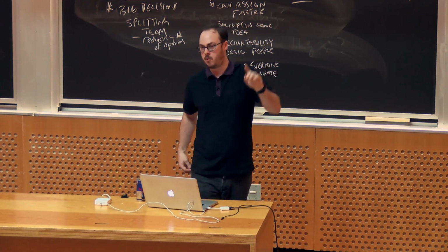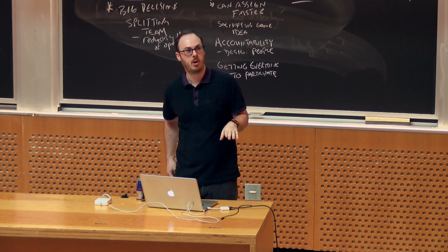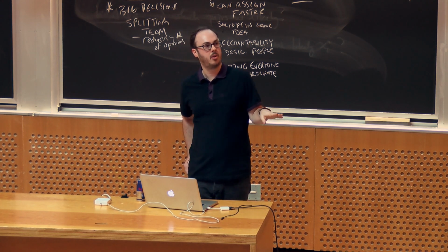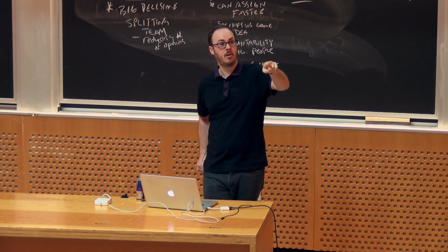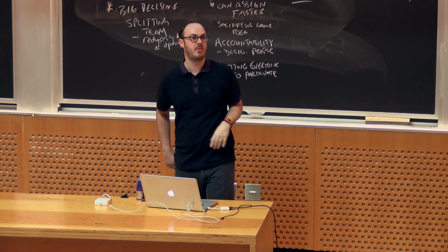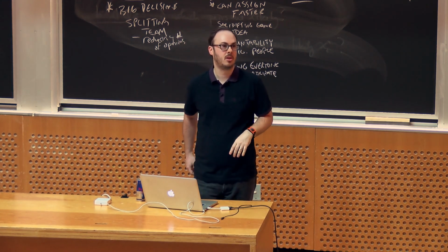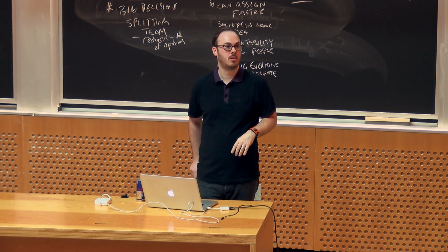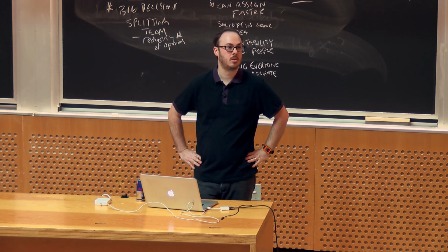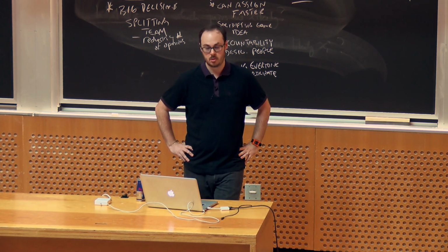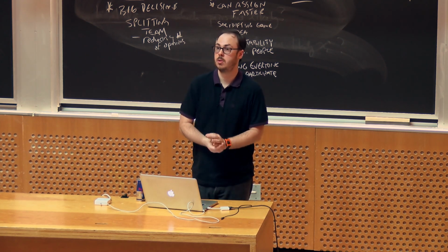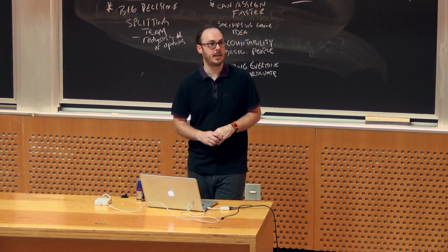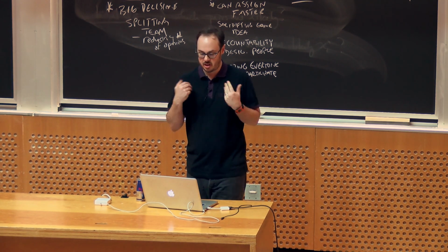So who has a formal sprint process where you plan your sprint before you start? So you create a task. You create your sprint task list at a meeting. Is everyone there, or that's when you're saying not everyone's there? We have the tasks, and we hope to complete them by the end of this week. Okay. So we do have a formal, week by week, this is what we want to get done this week. Okay, cool. And you had a meeting to create that? Okay. So then you have your daily stand-ups.